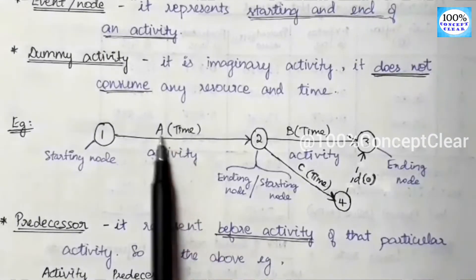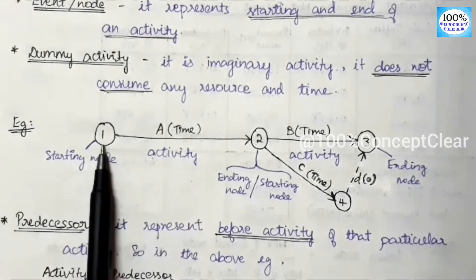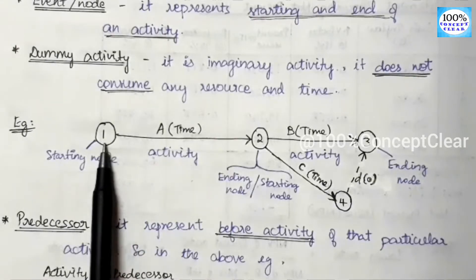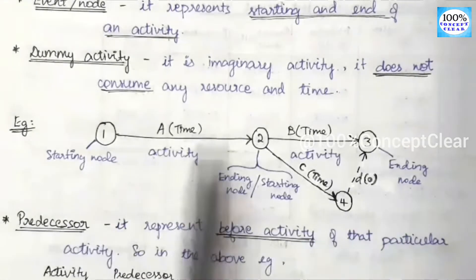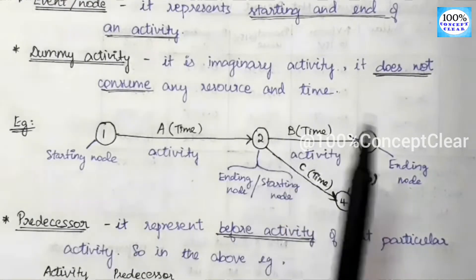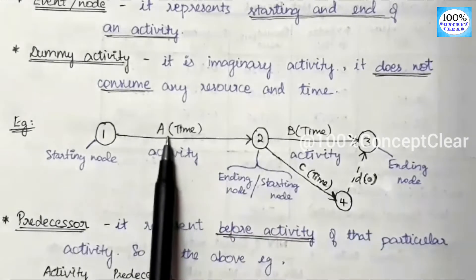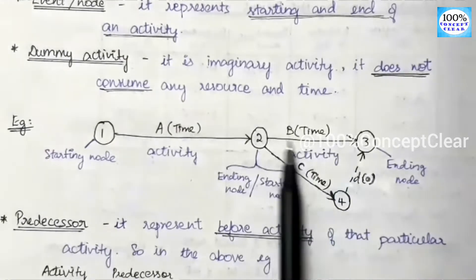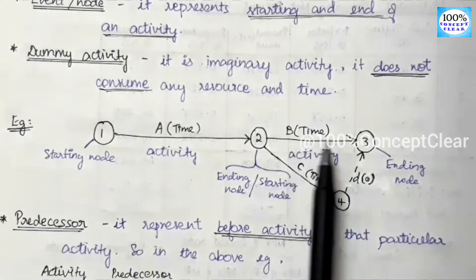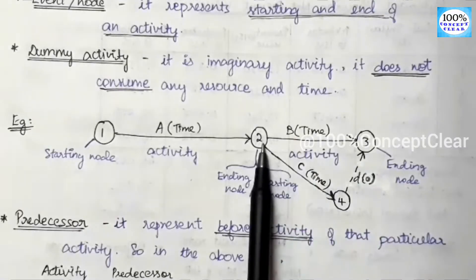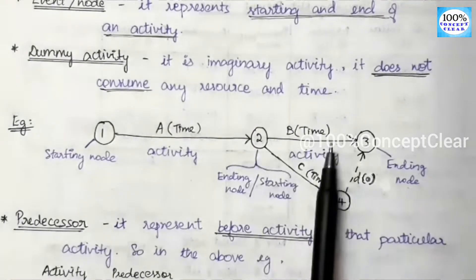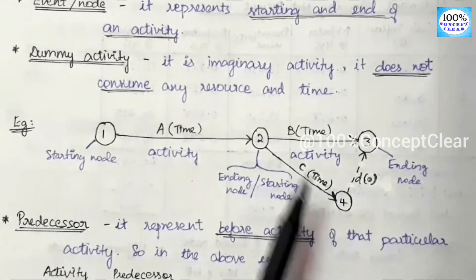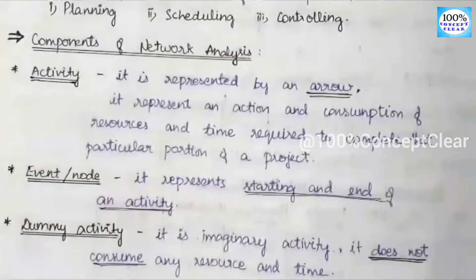For example, activity A has a starting node and an ending node. Node 1 is the starting node, and the ending node follows. So A activity starts at node 1. Then we have a second node and a third node. B activity has starting node 2 and ending node 3. We identify each activity by specifying its starting node and ending node.